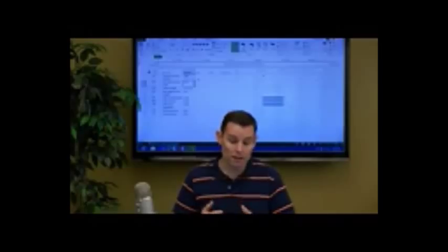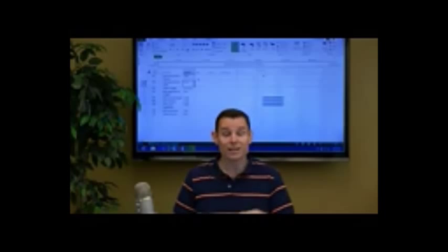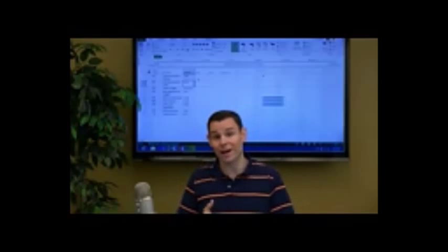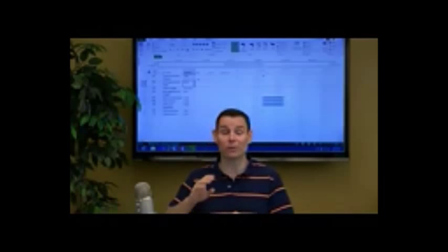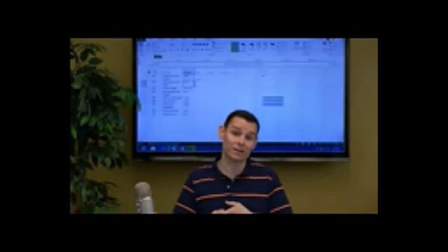And then the boss approving the ideas. I talked with his admin assistant. She says 2 hours is way too fast. The boss has a ton of meetings. He's going to want to review that list of ideas and vet it. And he's got travel, so you're going to want to give him at least 2 days. All right.